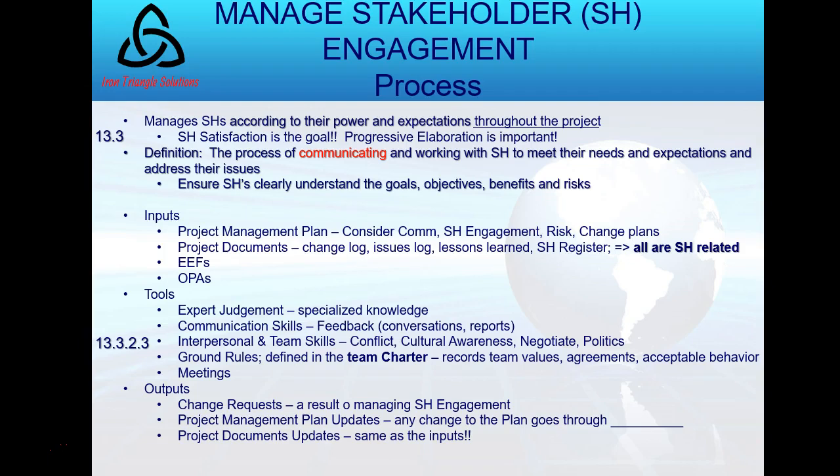There are ground rules that the project team is going to start. So we have the project charter, which is formally signed by the sponsor. But now I'm talking about the team charter. There is the term, and be aware for the new test, this was not on the old ones, but there's a concept of a team charter, and by there we write out the ground rules. How we're going to respond to each other, about courtesy, about respect, about dignity. When I send an email, I expect an email within 24 hours, clock hours, or maybe 10 business hours, things like that. And so it's a way of defining acceptable behavior.